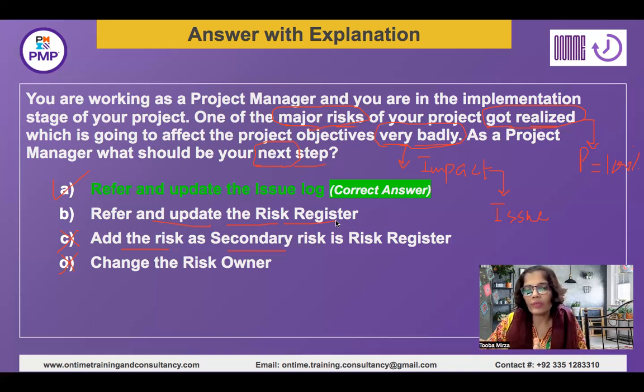You go back to your risk register and you update it with the important information, specifically the status, because now it is going to be deactivated from the risk register. It is not going to be deleted, but it is going to be deactivated. And maybe with some comments or some reserve information, or some information about how much the preventive action or the response strategy worked.